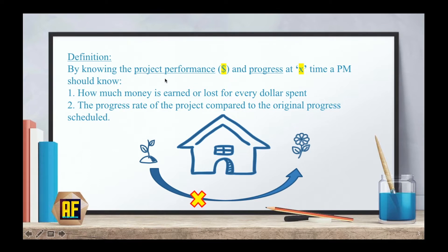By knowing the project performance and progress at a given time, a project manager should know how much money is earned or lost for every dollar spent, and the progress rate of the project compared to the original progress schedule. So imagine that you're building a house — you pick a random day, stop the project, and by knowing how much you've performed and progressed at that time, you will be able to know: are we making money? Are we losing money? Are we ahead of schedule? Are we behind schedule?